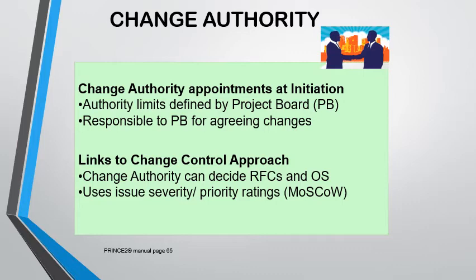Now, as mentioned earlier about the authority regarding changes, the lowest level is given to the project manager, while the next is given to the project board, and then the highest level is given to corporate. But the project board has to determine whether they require a role or a deputy to handle certain changes.